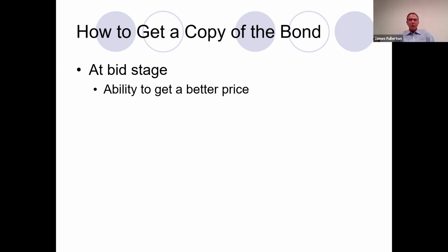And you can coach your customer, the subcontractor, that the sub wants to verify the bonding company as much as the supplier does. And say, look, customer, let's go get a copy of the payment bond from the general contractor. We can confirm the project is bonded together.